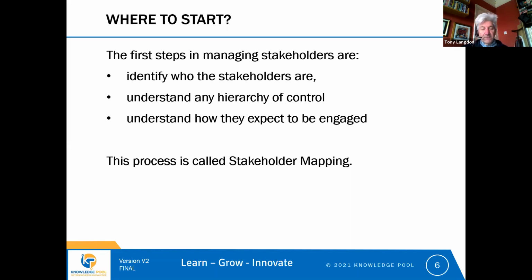The stakeholder map that you draw is a dynamic thing, because stakeholders come and go. Individuals can leave the business, new individuals can join the business. A stakeholder map will need to be kept up to date to reflect people who are in contact with the project, so that if somebody leaves the business and they were representing the interests of, say, the IT department, we know that somebody new needs to be appointed to take their place, and we would update our stakeholder map to show who the new IT contact is for the project.